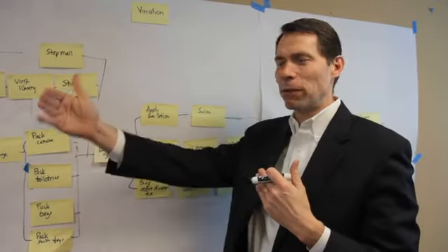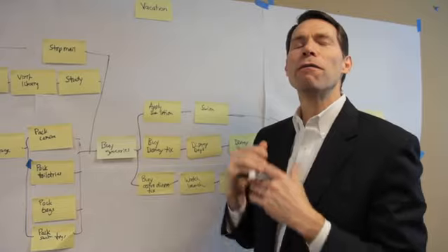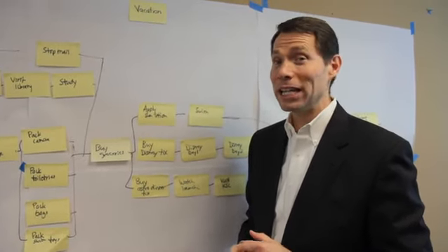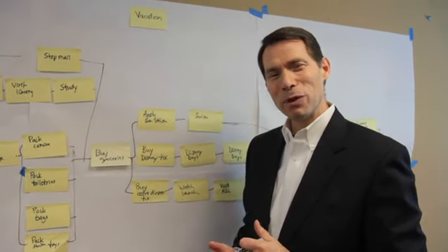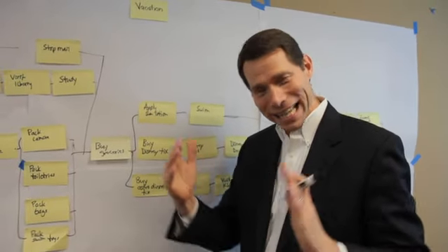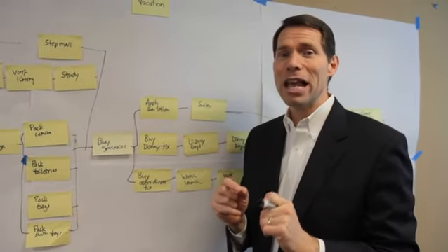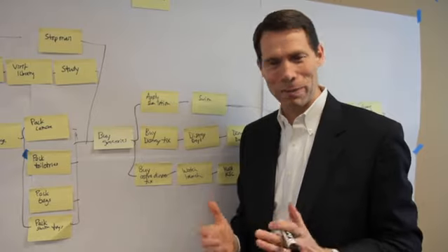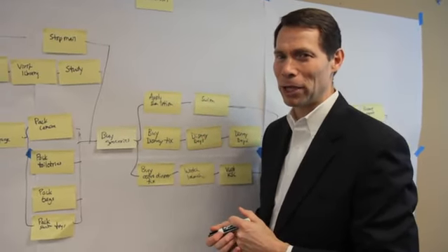our horizon for managing this project might be, well, what's going to happen this week or next week? We're not thinking further down the road. And that's a really important thing for project managers to be able to do, is to look further down the road, anticipate problems. Also, sometimes what doesn't look like it's possible to do, if we actually do sequencing, what we find is it is possible to do. Now, we might need some more people to do it, or we might need to rearrange some things, but it helps you understand, can we actually hit the date constraints that we've been given? It gives us the ability to answer that question much better.